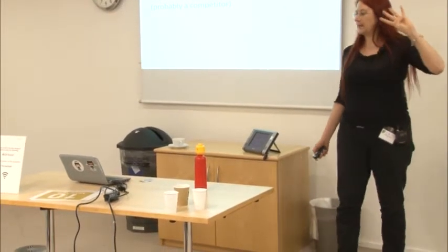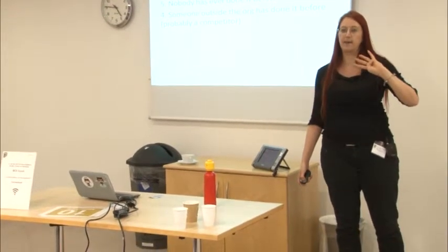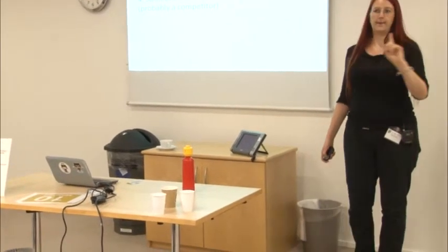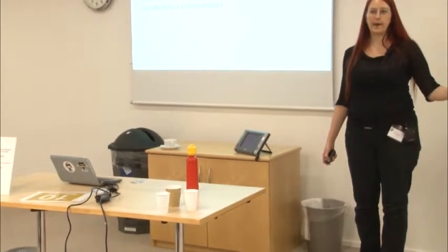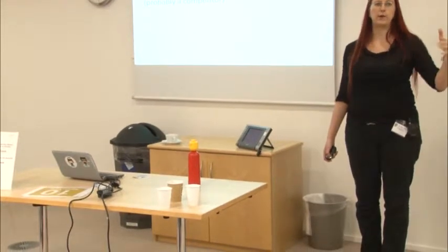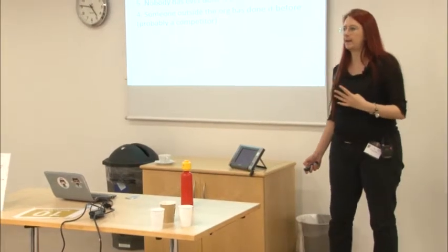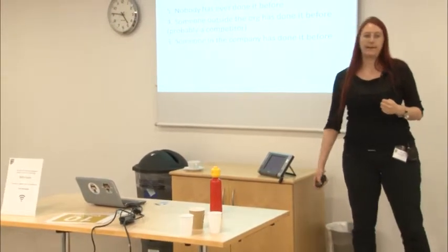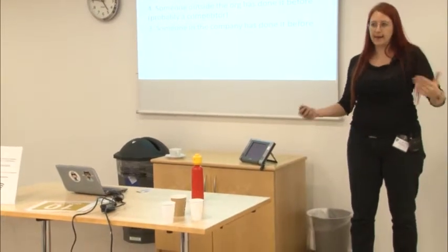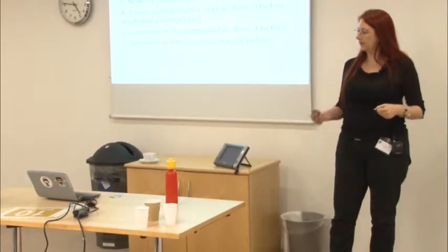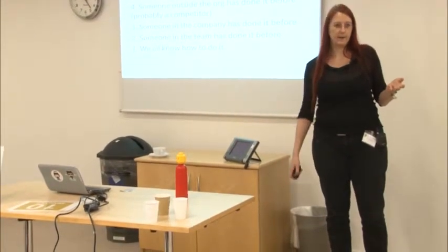4: somebody outside the organisation, outside your group, has done it before, and you have no access to expertise. Now note, all you know is that somebody has done the bit that you can see of it. You don't know what they discovered, you don't know how long it took, you don't know who got fired, you don't know which regulators came out of the woodwork, so it's still very high discovery. 3: somebody in the company's done it before, or we have access to expertise. We can get an expert in who's done this before. Someone in the team's done it before, and we all know how to do it.